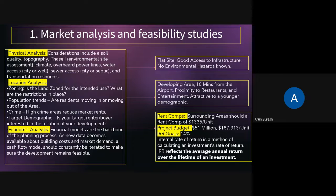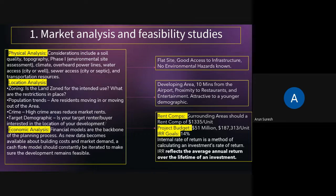In terms of market analysis and feasibility studies, there are three things to look for. One is physical analysis — you check whether the site has good soil, what the topography is (uneven surfaces requiring excavation can be expensive), and whether there are overhead power lines along your property that may need to be relocated. These are things you look for in physical analysis.